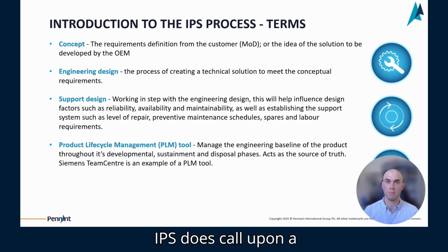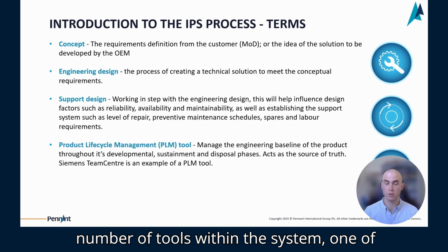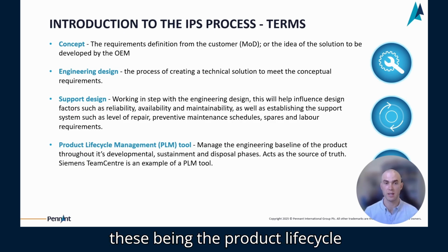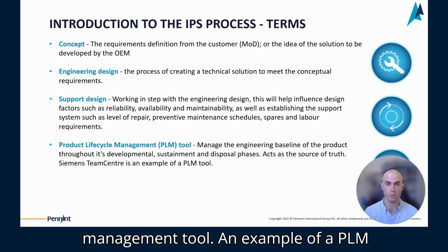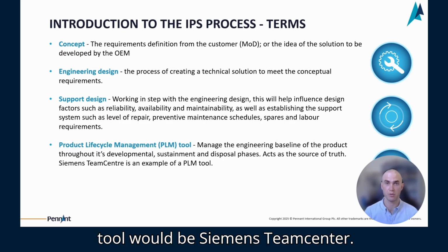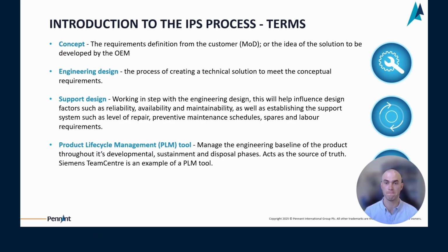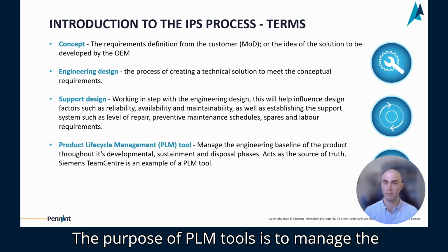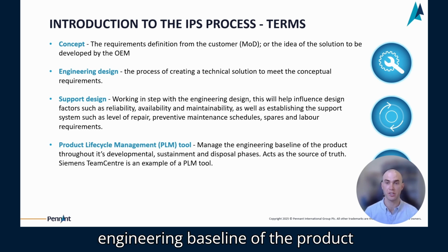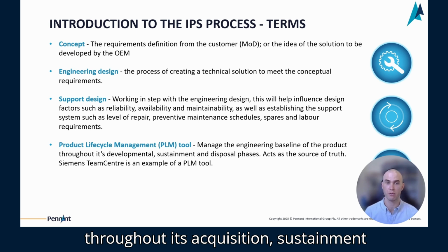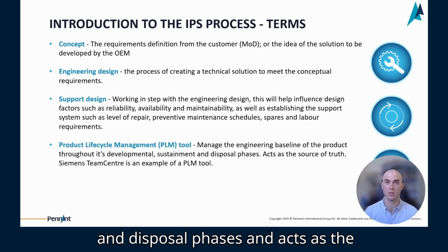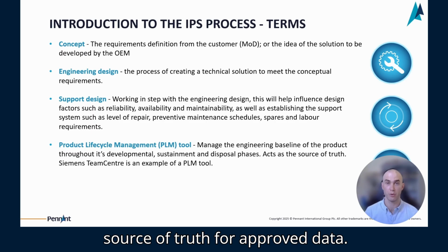IPS does call upon a number of tools within the system, one of these being the product lifecycle management tool. An example of a PLM tool would be Siemens Teamcenter. The purpose of PLM tools is to manage the engineering baseline of the product throughout its acquisition, sustainment and disposal phases, and acts as the source of truth for approved data.